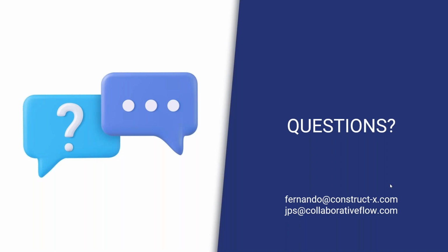And a really big deal is that if you do this well, you let your foremen and supervisors primarily be supervisors. I think we have to be very respectful of taking all their time and dragging them in. What I found is they don't want to sit in a planning meeting and talk about constraint analysis. They want to talk about their workflow. So we want to honor their time. If the Workface Planners are taking care of the logistics to support the last planner, then you're respecting their time, letting them spend their time in the field, and letting them do the things that they want to go do, which is making their crews flow well. Everyone loves to be on a smooth flowing job. So let's help them do that.